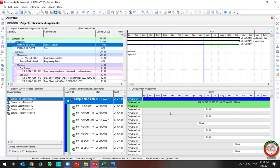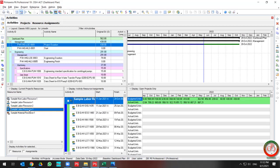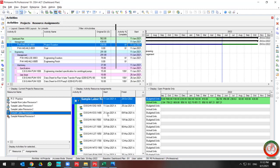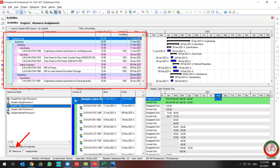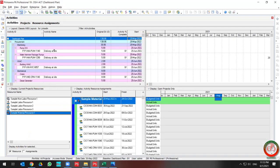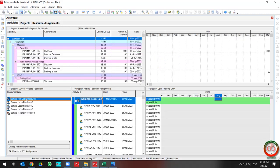Then, if you select a resource, the activities related to that resource are listed in the left pane. If you select different resources, the activities in the above section change based on your resource selection.